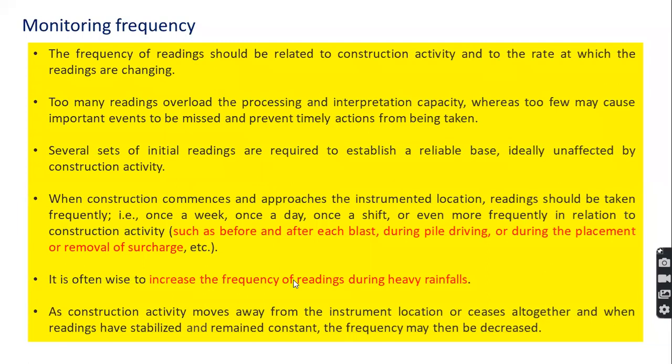As the construction activity moves away from the instrument location, or if the monitoring records seem to cease, we can think of reducing the monitoring frequency. You can take readings with a longer interval.